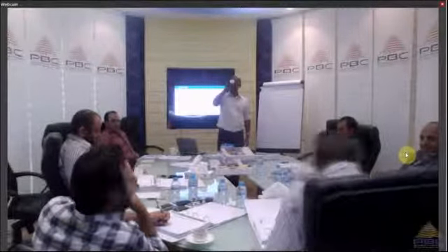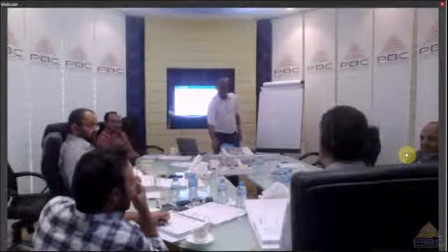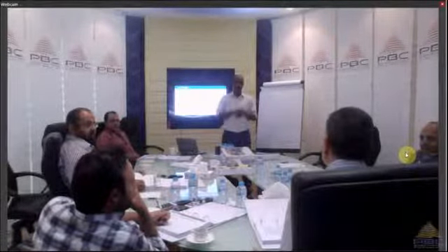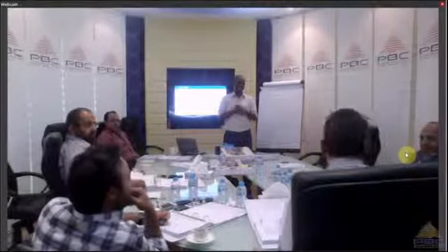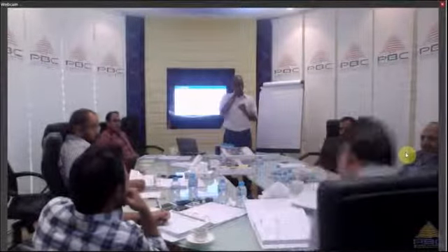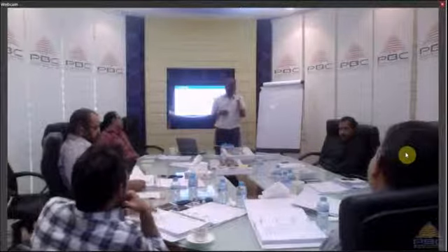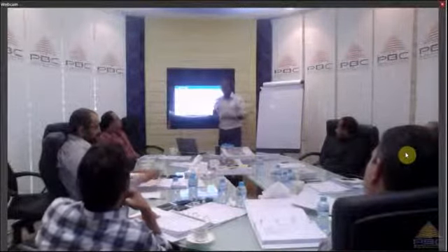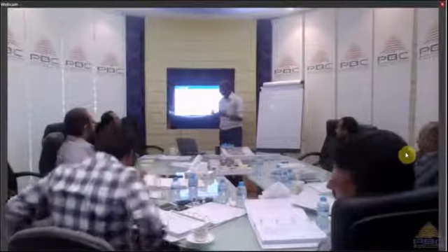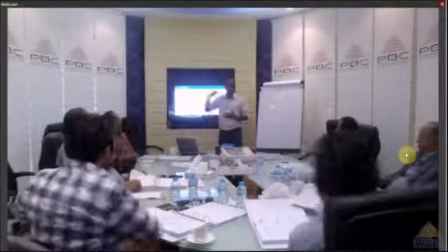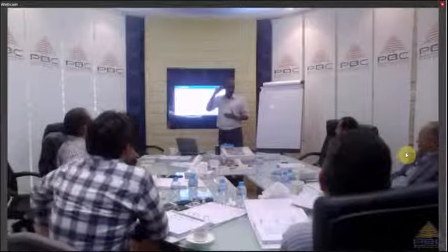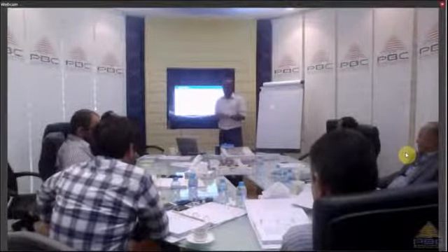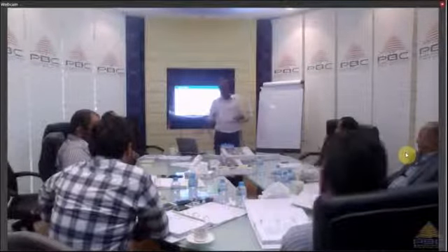You have to do a project, the same. I'm just wondering, we start excavation, pouring everything, and then the client doesn't have the permission, and the whole deposit amount for six months. Exactly, right? So this is very common, it happens a lot. And this can be solved by getting into this habit of listing the assumptions. Listing our assumptions on paper, challenging them all the time. It helps clarifying that. Okay?